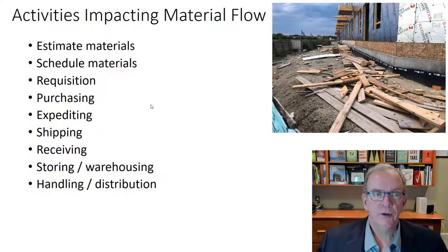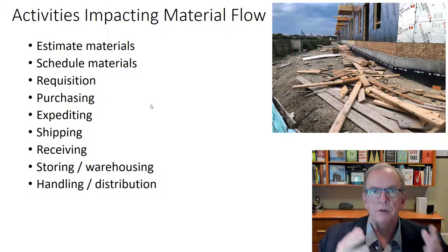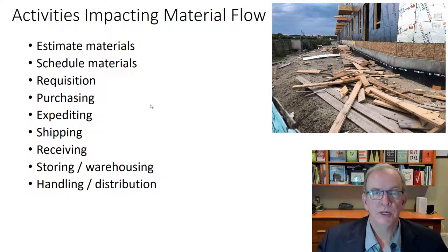Requisitioning, so we have to develop a system so that we can do our requisitions and get a purchase order for what we are going to order. Very often companies, internally, you'll have to get a PO number before you place an order, so that PO number is assigned to that job, and to the area of work the materials are being ordered for, so we can assign account codes to it.